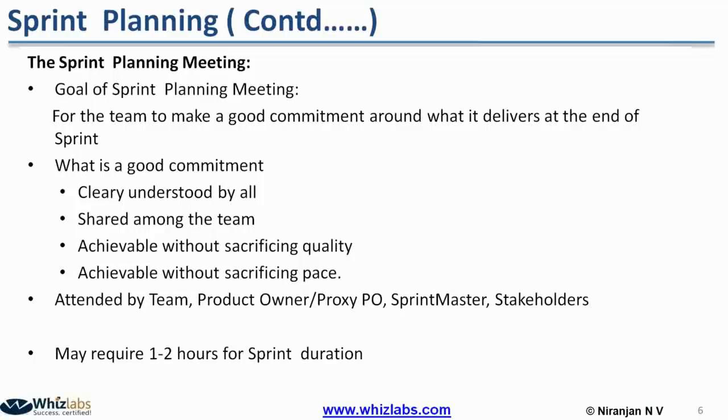Normally it requires 1 to 2 hours, relative to the whole sprint duration. It should not take too much time. For a sprint of maximum 4 weeks, it should get over in 2 hours, or at the most 2 to 4 hours, half a day.